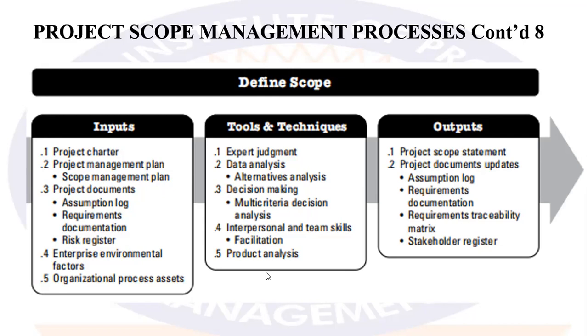By multi-criteria decision, we mean that we have different criteria we've created to decide whether this option is the best or not. In a voting approach, we could just pick one item and say we are voting on quality. If you want this quality, say aye. If you don't want this quality, say nay. We can vote on A or B. But when we have a multi-criteria decision-making approach, we have different components, and then we are deciding on them because we are looking at quality, we are looking at cost, we are looking at credibility of the people doing it, we are looking at the procedure, the strategy. So you have different criteria to make that decision.